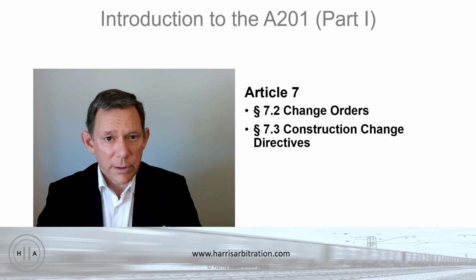Both the owner and the contractor agree, all right, yes, it's going to cost you X amount more to do the blue paint, and it'll take you Y number of extra days to perform that work, and so we will agree to modify the completion date by extending the date of substantial completion for 2 days and increasing the contract sum by X amount of dollars, whatever it costs you to go out and get the blue paint. And there may be some additional profit baked into that increase in the contract sum as well.